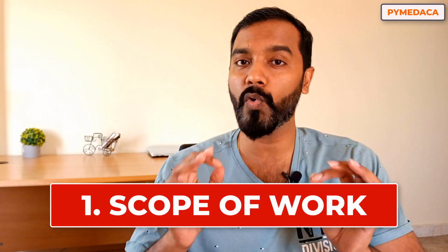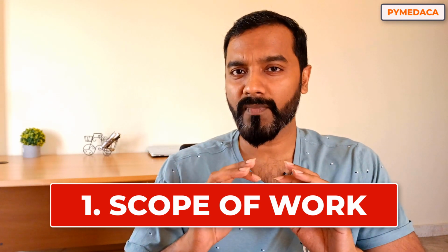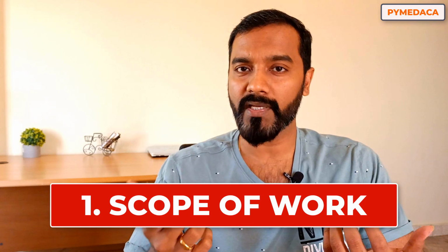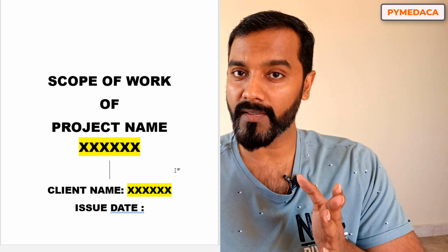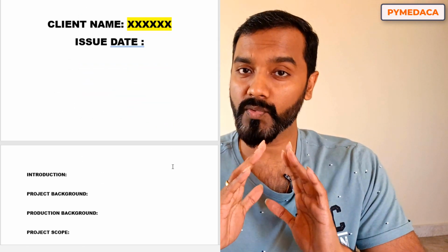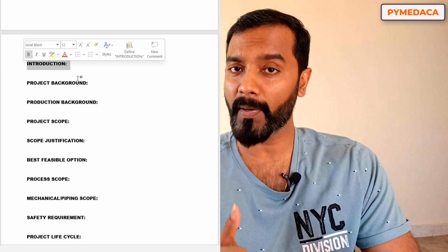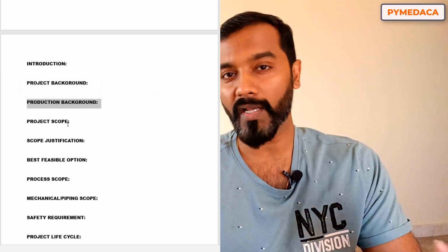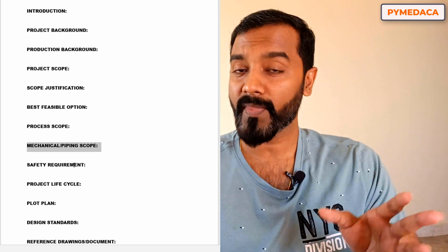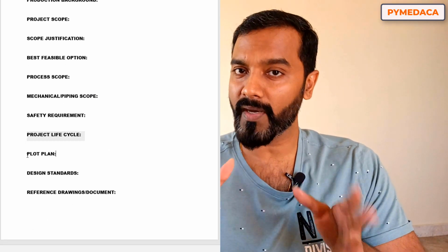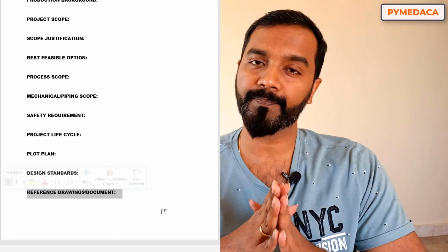The first one is, when you start any project, you should understand the intent of the project. To understand the intent of the project, you will have something known as the scope of work. The scope of work, to put it in very layman's language, defines the necessity and the purpose of a particular scope that you are going to design. For example, a client comes out with some requirement. It could be an installation of a pump, or installation of a pressure vessel, or a replacement of existing piping, or replacement of a support. So the basis and the purpose and the necessity of these requirements will be defined in a document which is known as the scope of work.